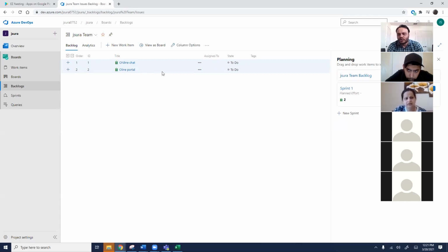So what are we going to do? You have to give them instructions, right? You have to give them the mock-up, the user story that they have to create. So one task would be for forgot password. One task would be for forgot username, right? So you have to give requirements for that. What does that screen look like? What is the requirement for that screen? This is what you need to code. So you discuss that with them, and then they will start coding that. So that happens before the sprint starts. So when the sprint starts, the development team has all the information that they need to start coding.